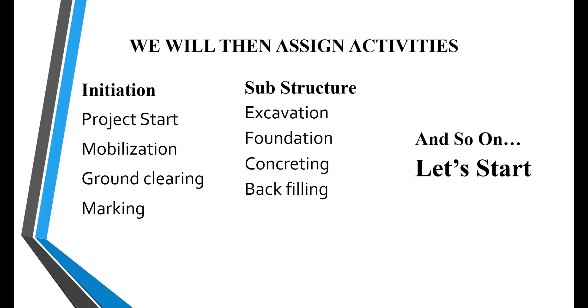For example, for initiation, we will assign project starting date, mobilization, ground clearing, and marking. And for the substructure phase, we will assign excavation, foundation, concreting, and backfilling. In the same sense, we will assign activities to other WBS. So let's start now.